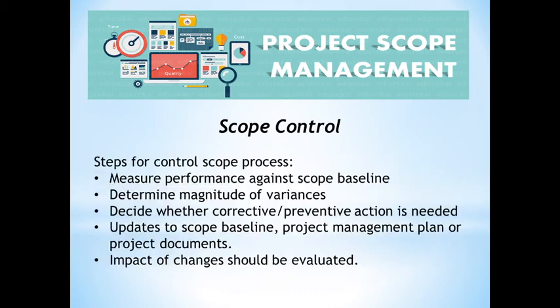The steps for the control scope process are: first, measure the performance against the scope baseline; second, determine the magnitude of variances; third, decide whether corrective or preventive action is needed; fourth, update the scope baseline, project management plan, or project documents; and fifth, evaluate the impact of any changes.